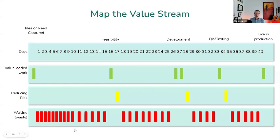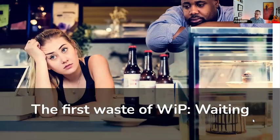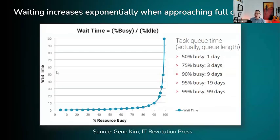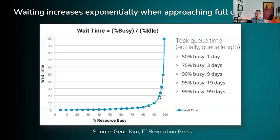Dynamic ways of prioritizing are sometimes addressed by frameworks like SAFe, with more or less success. The big point is that a lot of features spend most of their time just waiting to be done — and waiting is an insidious waste; no value-added work is being done. We can also see, from Gene Kim's blog on IT Revolution Press, something very interesting: as a team, individual, department, or resource approaches full capacity, the waiting time increases exponentially. When you're at about 90–95% busy, things aren't really all that different from having hardly any work to do — work flows through quickly.